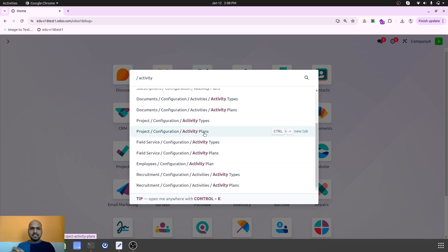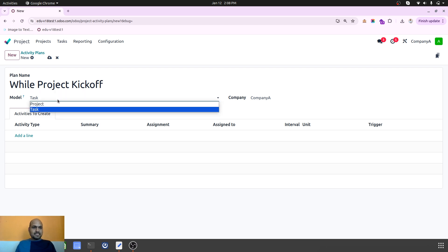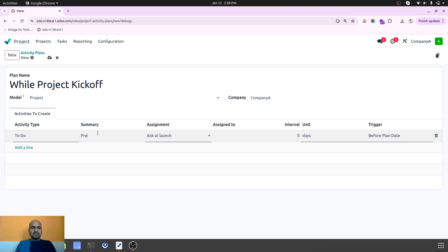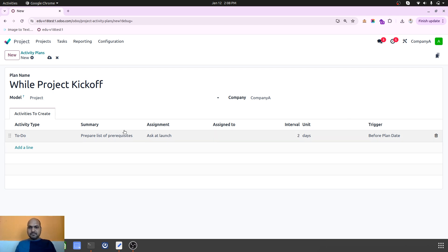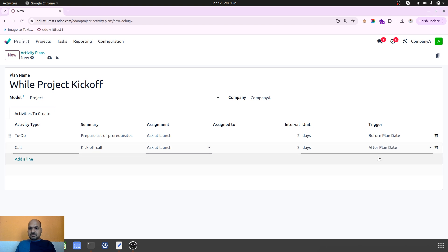Let's say I want to plan something in project. If I go into project, during a project kickoff I want to plan an activity. In that model I can define whether it applies to a project or a task. On the project I can define 'Prepare list of prerequisites for the request', then assign a project manager to do it two days before the plan date — that's what I want my project manager to do before the date.